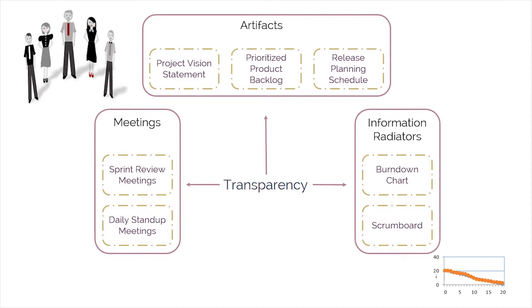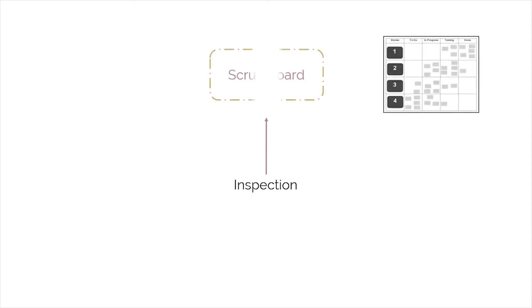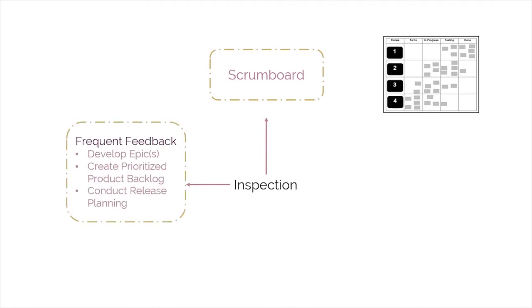The next characteristic of empirical process control is inspection. Let's have a look at the displayed diagram, which summarizes the concept of inspection in Scrum. Scrum provides a point of inspection with the use of a common Scrum board and other information radiators, which show the progress of the Scrum team on completing tasks in the current sprint. Feedback collected from the customer and other stakeholders during the develop epics, create-prioritize product backlog, and conduct-release planning processes give additional opportunities for inspection.